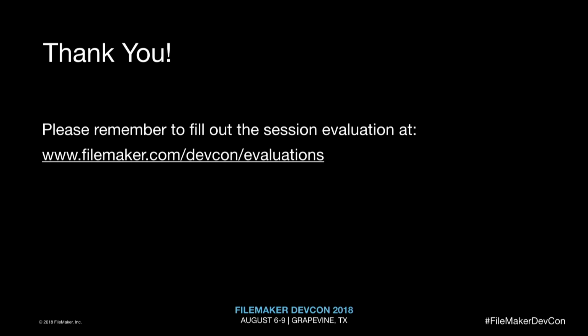Yes. The projects that I've run Agile with, we love using Jira because you can formulate multiple sprints at one time. So you can take your bigger project, formulate what modules you want, categorize them into different sprints, and launch your sprint. On each sprint, you can have a description of what you're trying to accomplish during that sprint, and you can set up a lot of controls. So you can add documentation to it, you can add testing to it, and things like that. So that seems to work well.